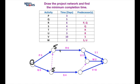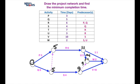Moving across the top, only one arrow into the node after R: five plus six is eleven days. Across the bottom, five plus four for S gives nine days — the best time to that stage. At the node coming off U there are two arrows: the dummy from S gives nine days, and U's path gives eleven plus three equals fourteen days. Fourteen is the larger, so that node is fourteen.